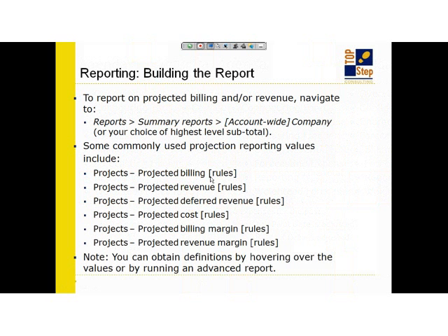The only exception of when rules are not used is that straight line billing projection feature in the system. Okay, so if you're struggling with what fields to be putting on a report, make sure you just pull something that has rules in it and the word projected, and those are typically the ones that you want. Okay.